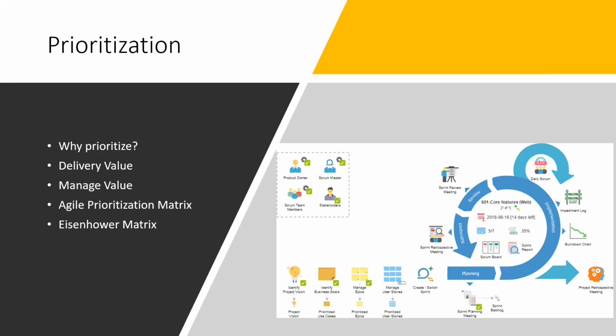So you can prioritize those epics, which are again collections of stories. And at the end, you have a big product backlog. We prioritize use cases, prioritize epics, and within those epics, you can prioritize the user stories that need to go through. So you have all the prioritization done from product vision before we start the first sprint.